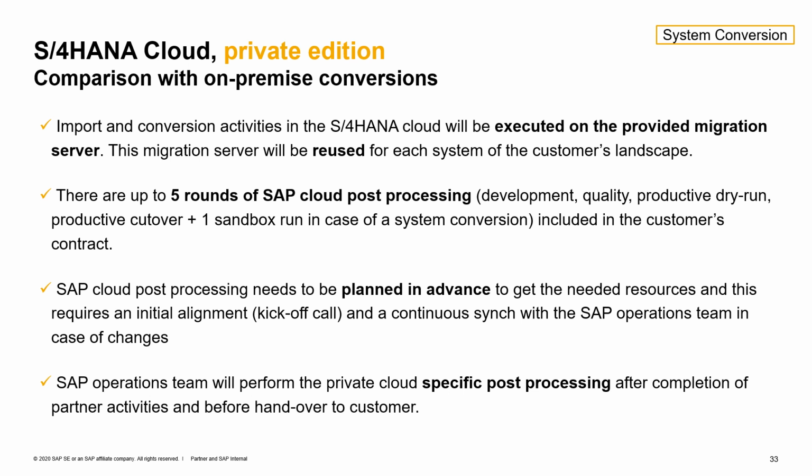You can decide as a partner to execute additional rounds of conversion without requesting our SAP Cloud Operations team to perform their post-processing. Post-processing needs to be planned in advance because our team needs to plan the activities, and this can be aligned during the initial kickoff call with our operations team. And this will also require continuous alignment if the plan changes over time. The operations team will perform all the specific post-processing activities after you have completed your conversion activities and before the handover to the customer.